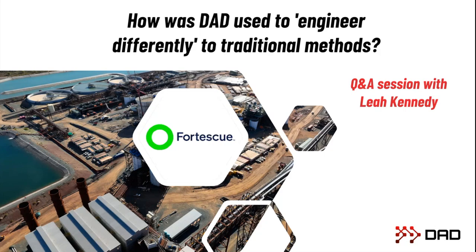Yes, so we implemented a procedure essentially using DAD. Traditionally we revision control drawings, so we had to have a way of controlling this information, making sure it is correct, getting reviewed, getting checked. And so we did that within DAD. That was done by reviewing the object and revision controlling the object. When I say the object, I mean the cable, the pieces of equipment. Everything was given a revision, and it went through the process like that.